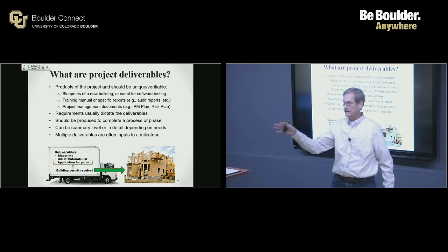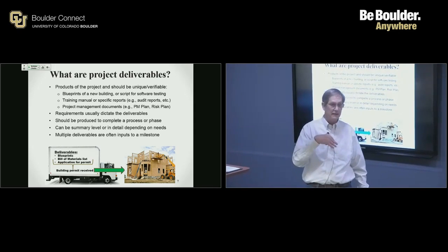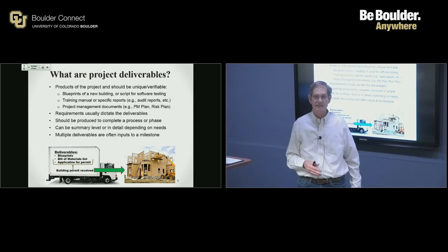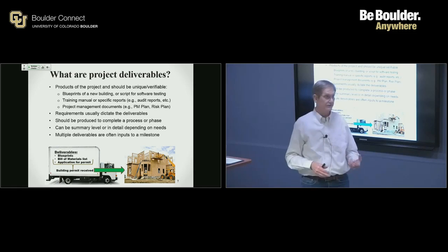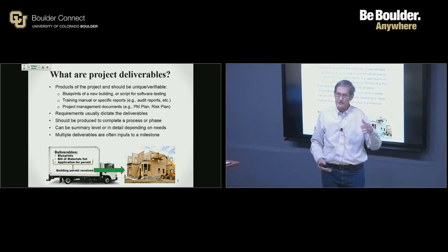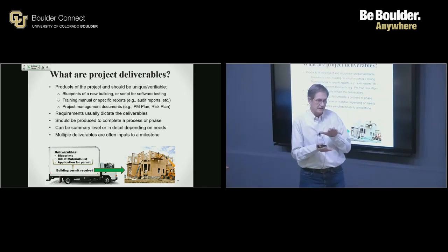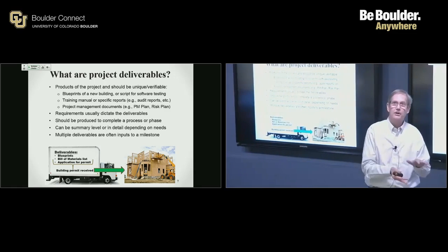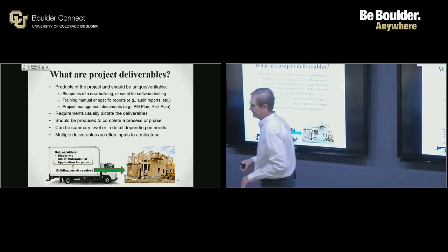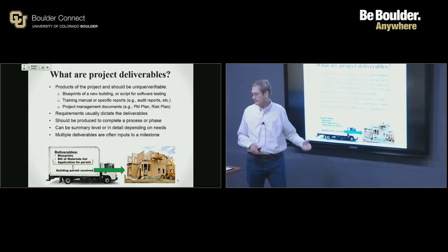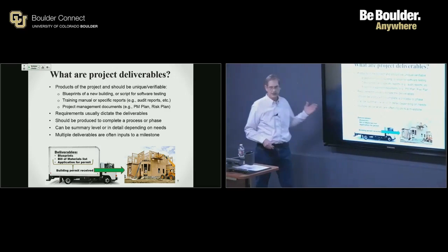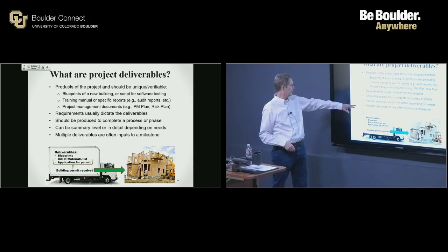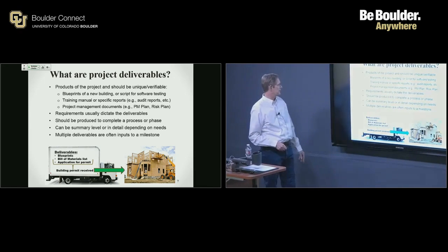The assumption within our projects here in the classroom is that that activity is the responsibility of the construction or the build team. Okay? The bill of materials, the blueprints from the design team, I take those over to the build team to apply for the building permit. And once you obtain the permit, that becomes a milestone, allows you to continue to the next process. So look for check marks here as far as milestones.